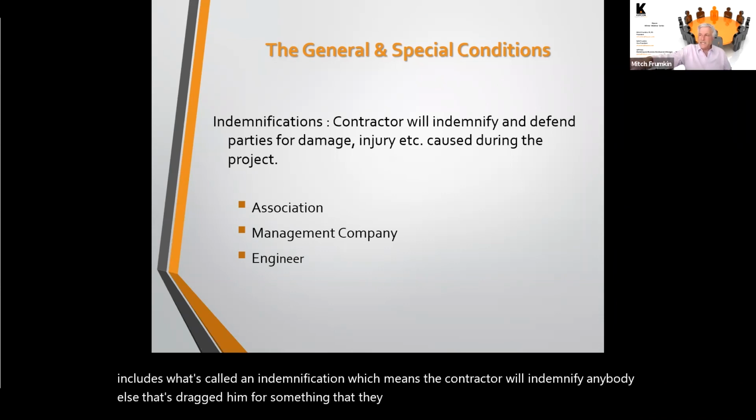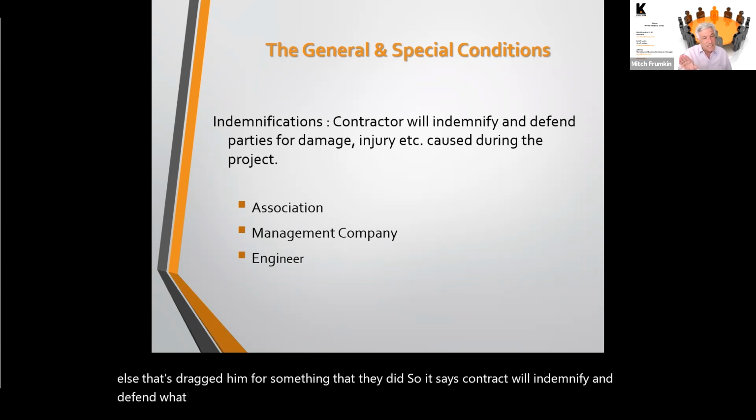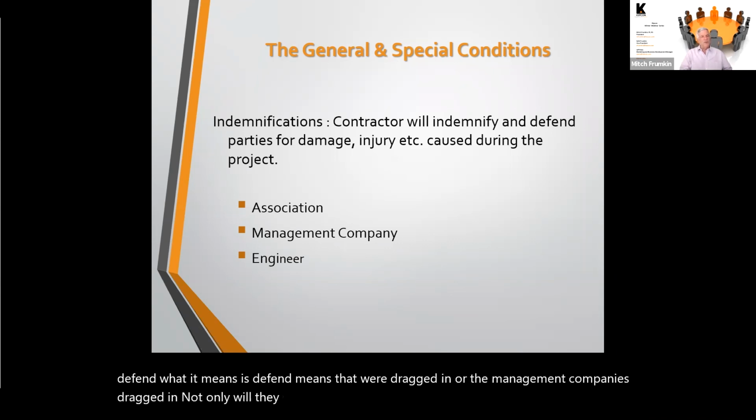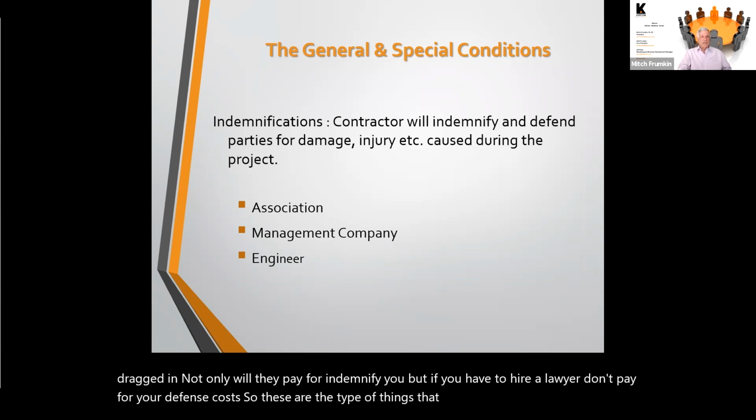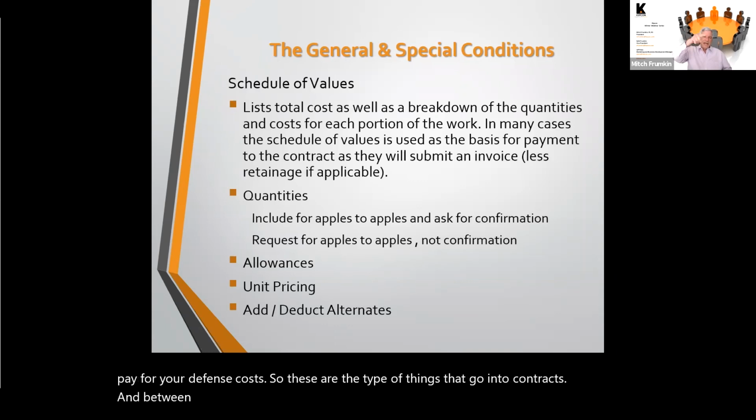So it says contractor will indemnify and defend. What it means is defend means that if we're dragged in or the management company is dragged in, not only will they pay to indemnify you, but if you have to hire a lawyer, they'll pay for your defense costs. So these are the type of things that go into contracts between the association and the contractor.